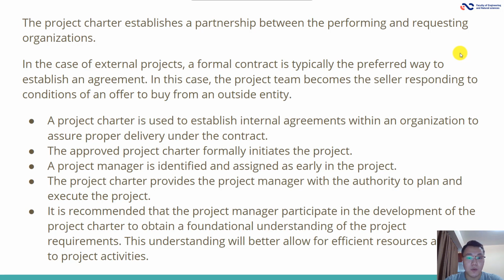The approved project charter formally initiates the project. A project manager is identified and assigned as early as possible in the project. The project charter provides the project manager with the authority to plan and execute the project. It is recommended that the project manager participate in the development of the project charter to obtain a foundational understanding of the project requirements. This understanding will better allow for efficient resource allocation to project activities.